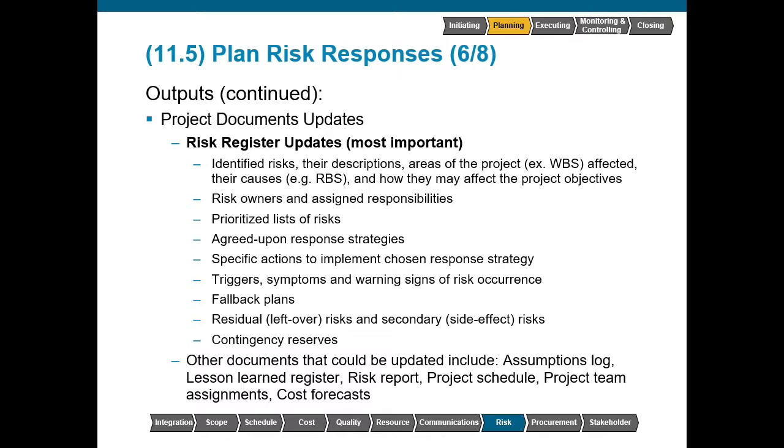We can again reprioritize this list of risks based upon that qualitative and quantitative analysis, and also now based upon the responses that we've prepared and what we believe their effectiveness could be should that risk event occur. We'll document our agreed upon response strategies and the specific actions that we will have to implement with these strategies should the risk event occur.